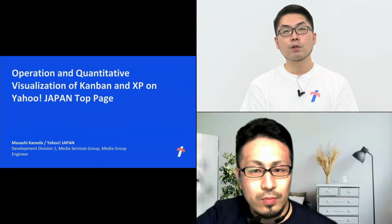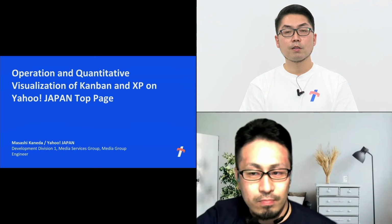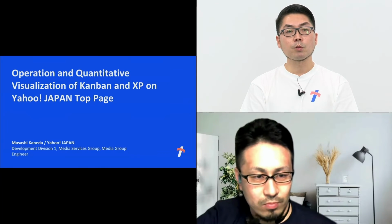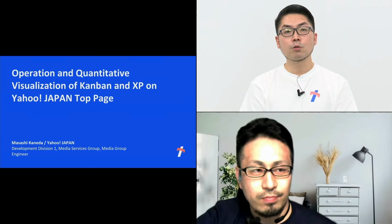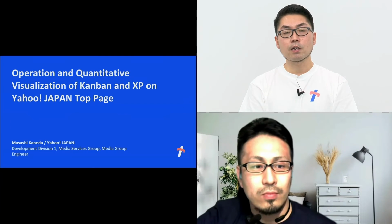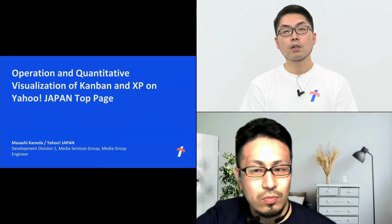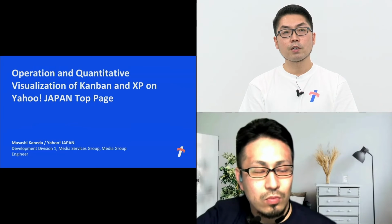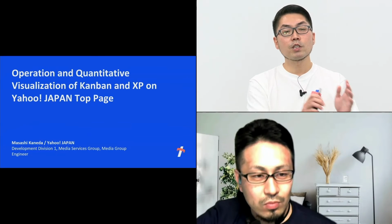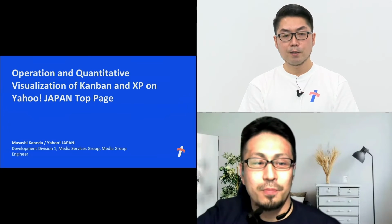Well, different time frames apply. We didn't talk about it, but there are review sessions at different levels. Every week we have a retrospective review by each team, and cross-team review meetings are also held every week across different teams. And for the entire product, we have meetings and surveys with the employees at least every quarter, to identify issues and try to resolve them on a weekly basis. For major issues, we try to address them on a quarterly basis and check the results by the quarterly surveys. Thank you.